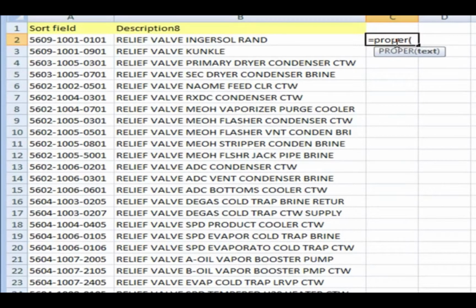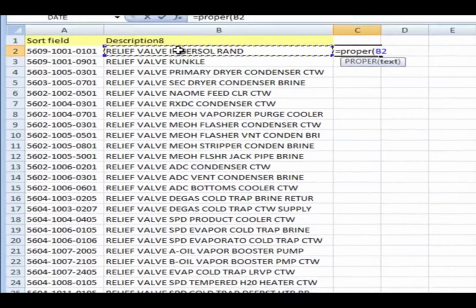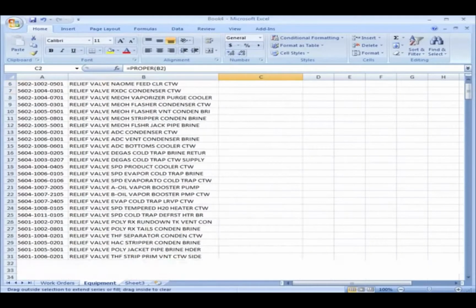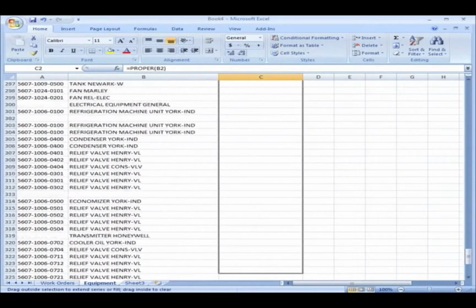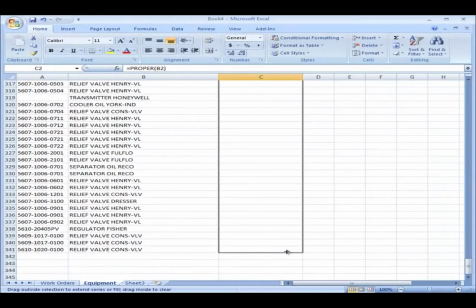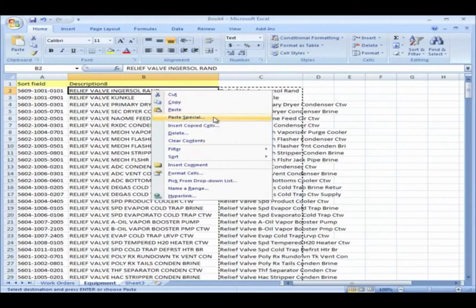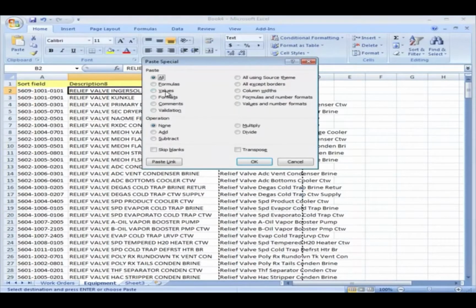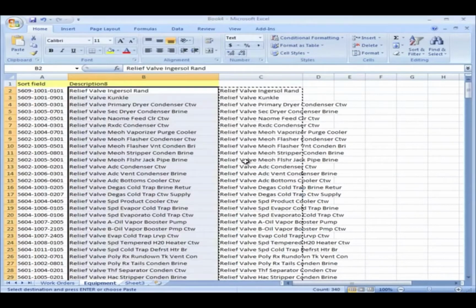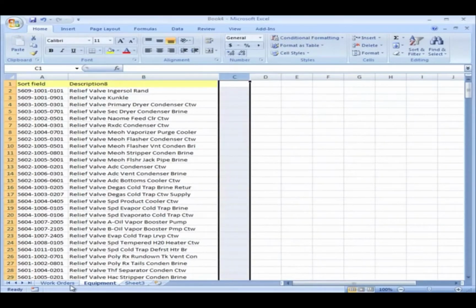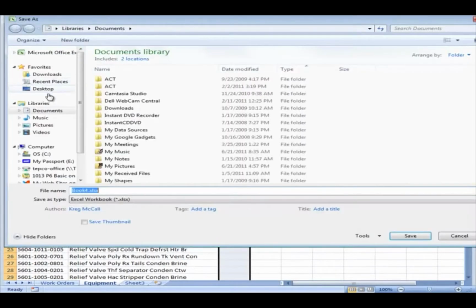So if you want the SAP numbers, remember you can build another activity code that says your code fields, and we can start populating all these fields. But this is setting this up to get the actual dictionary files into the schedule. And I'm just illustrating this with the actual work orders, which I'll put at the cost accounts, and equipment numbers, which I'll put at the activity codes. Let me paste and clean this up. So I've got a couple here, and I would go right on through with all my coding, my structures, everything would be in this and getting ready for my dictionary.